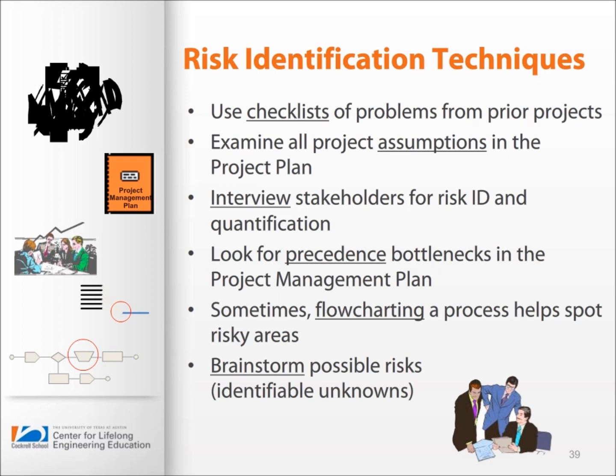Look for precedents, bottlenecks, and dependencies where risk may exist. What happens if you don't get a delivery on time and what does it affect downstream? Flow charting a process using diagrams can also help you identify a risk area or a bottleneck.